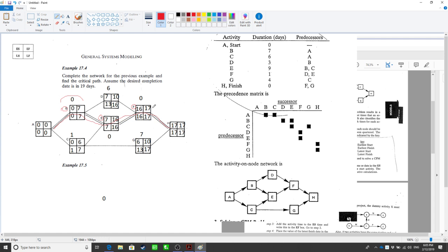path, all the activities actually have no slack time at all. So we have to do this one after another, one after another. After we finish this task, we will do something else. After finishing B, we will do E and D. After finishing E, we will do F, without any slack time. But the other nodes are not on the critical path. Okay. Well, this is how we identify the critical path of the project.